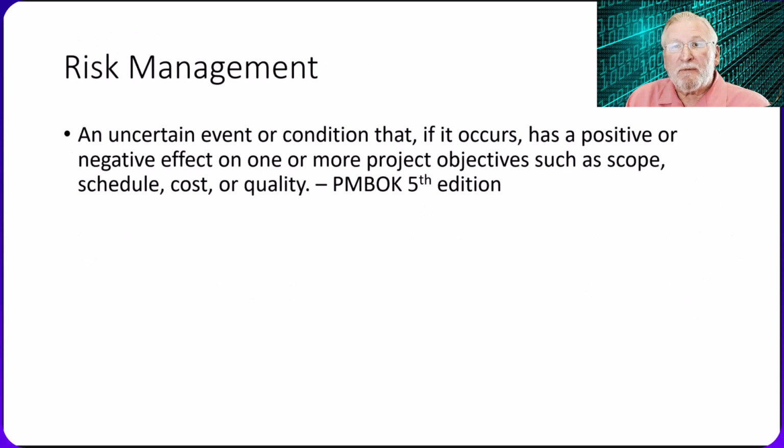So I've mentioned that events, if they occur, can have positive or negative effects. This is a little different than our everyday sense of risk, which generally only considers risk in terms of negative consequences. Good managers look for ways to reduce risks and enhance opportunities, and that's good risk management. Another important part of the definition is embodied in the phrase, if it occurs. If it occurs, it's no longer a risk, it's an issue.